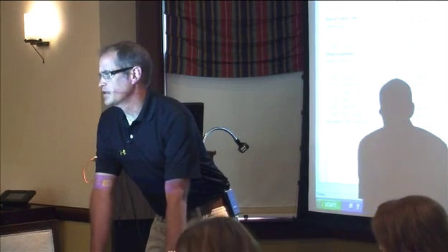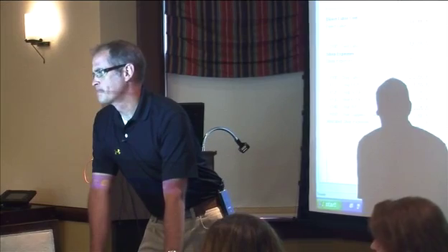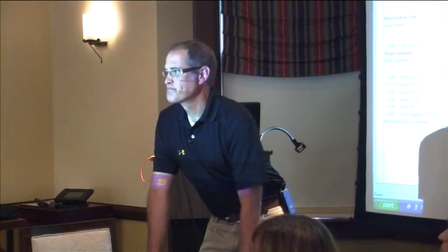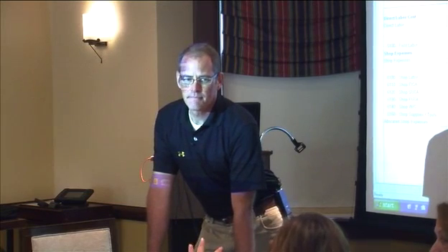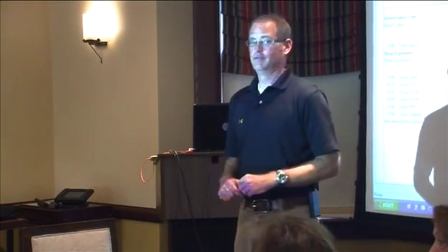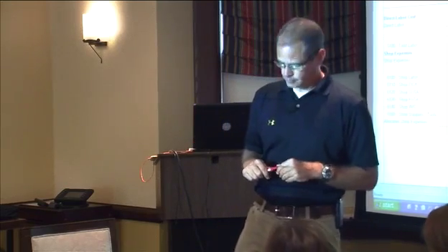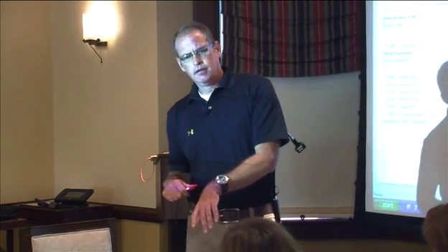How many cost codes do you guys run in your business? What do you think, Joe? Too many. That's what I think. Too many? I mean, it's based on a DOT. I would say where our company profits, we should not use more than 30, with the work that we perform ourselves. Yep. When you go above 50, now you're getting crazy. It's a crapshoot on what you're going to get back, right? Yep. That's where we fail a little bit in the codes.